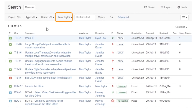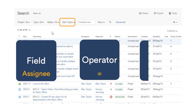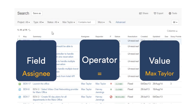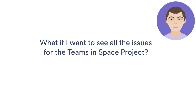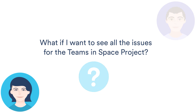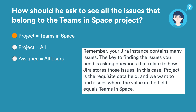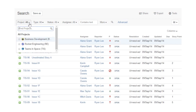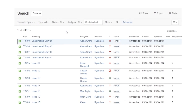What I've just done is created a simple query which contains three elements: a field — assignee, an operator — equals, and a value — maxTaylor. In Jira, this is known as a clause. Now, what if I want to see all the issues for the Teams in Space project? I'll select Teams in Space from the project dropdown, and now we're seeing all issues for that project.